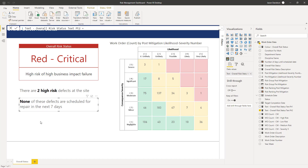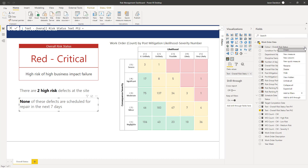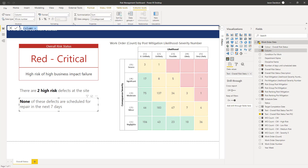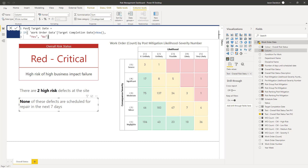Let's crack on with the third text here, which is going to count the number of work orders in the client over the list status that are past the target finish date — so actually overdue the repair date first assigned to them. We're going to create a new column containing a flag that will be yes or no: if the work order target completion date is less than now, then it's yes, meaning the work order has passed its target completion date; otherwise it's no.